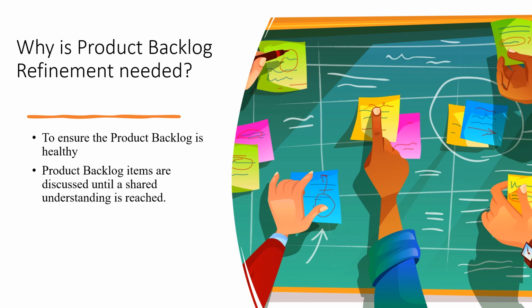So items are broken down until the developers are fairly confident that they can complete them within a sprint. This gives the product backlog a level of transparency that reduces the risk. The risk is exposed by not completing an item within a sprint, thus giving away the opportunity to generate value for the organization.